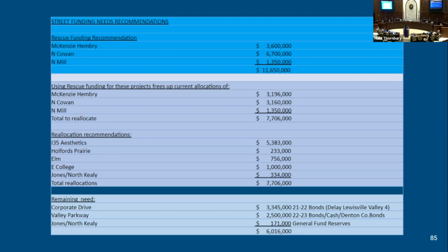The only other thing I might mention is that as you went through that process, you may have noticed that we are actually overfunded in a couple of projects. When you look at the Indian Oaks as well as the Timber Brook subdivision, both of those have about $2.5–3 million more than we need right now. If they continue as they are, when that project is complete, if we do have that overage, we can certainly use that to free these up and not delay anything. So as you know, it's always a moving target, and we do our best to reallocate as we go. Nothing ever stays the same from one meeting to the next, but we do have a little flexibility there.